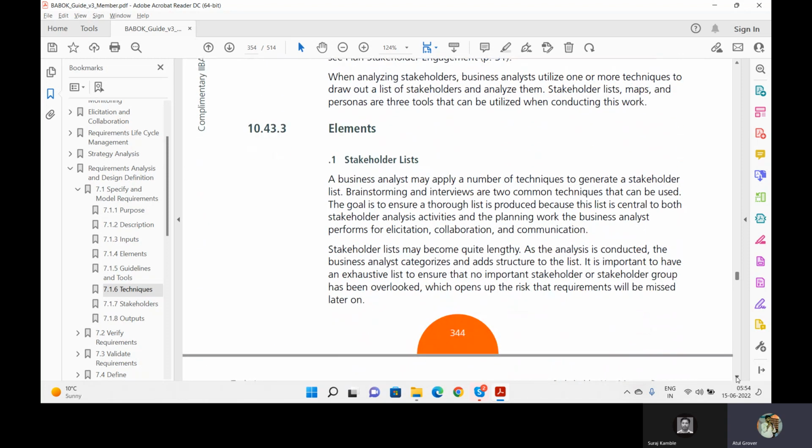Number one, you have to find out the stakeholder list, that who exactly are my stakeholders. Someone I will call to brainstorming, someone to focus group, someone to workshop, but who are the stakeholders in this list? Don't prepare a stakeholder list that is so lengthy. No, you will be gone in that case. Your stakeholders should be limited, because more stakeholders means decisions will be delayed. A decision that three of us can take together, if I ask 30 people, will take 4 days. If I ask 3 people, the work will be done in 1 or 2 days.